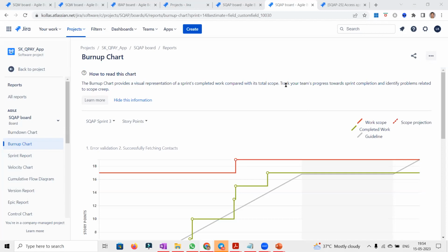Just now we discussed the same thing, Amal. Ideally, the original estimate is not supposed to be changed. Let it be whatever it is, whether it is 1 hour, 10 hours, 20 hours, or 40 hours, let the original estimate be as is. Log the difference in the actual time log.